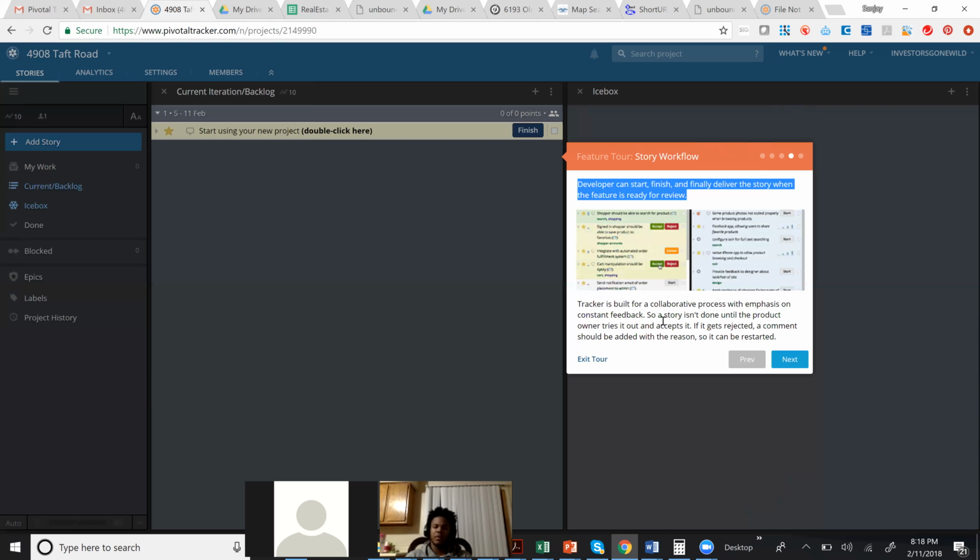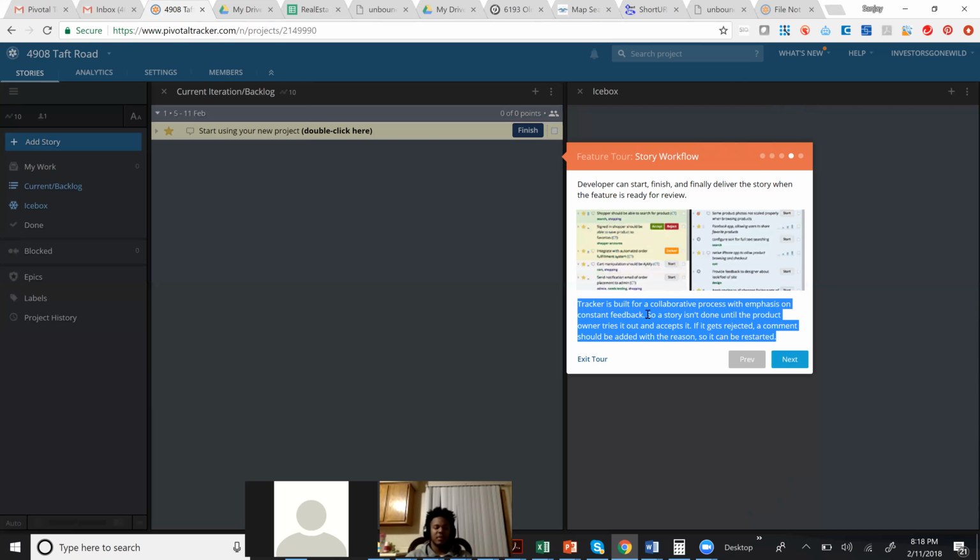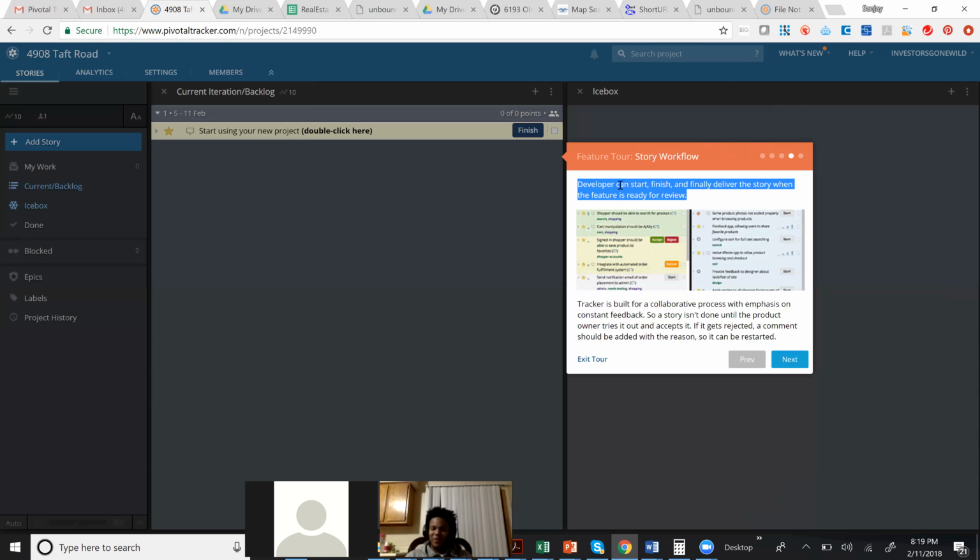Okay, absolutely. It's just like basically dotting your I's and crossing your T's. Absolutely. So it's giving you constant feedback to make sure that particular activity is really not done until you, as the project manager or owner, accept it. And if it gets rejected, a comment should be added, and the reason, so that it can get restarted, basically. Okay. Yeah, I see the power behind it. Yeah, definitely, bro. Man, this is so foolproof.